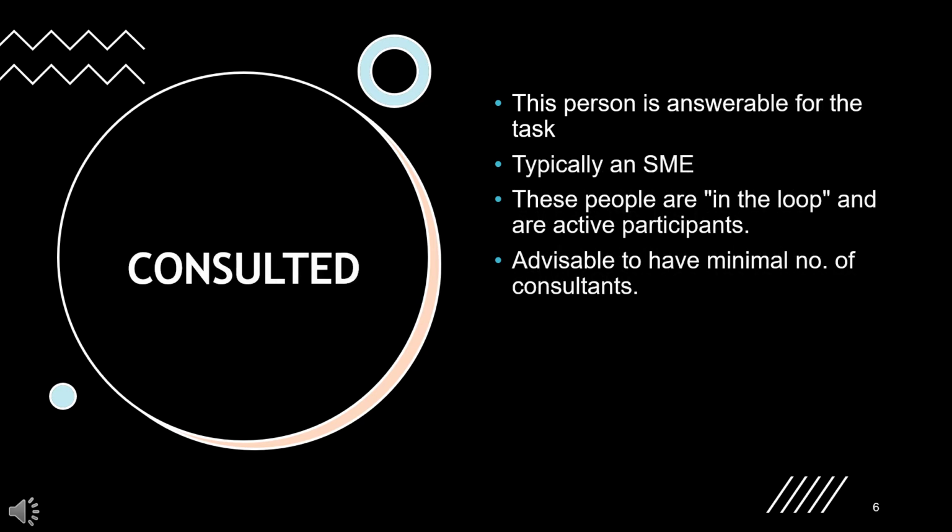C stands for consulted. This person is the advisor for the given task, generally a subject matter expert whose opinion you seek before you decide on a decision. It is advisable to have a minimal number of consultants, as too many consultants can slow down the process because it leads to too much deliberation and also idle discussion time.